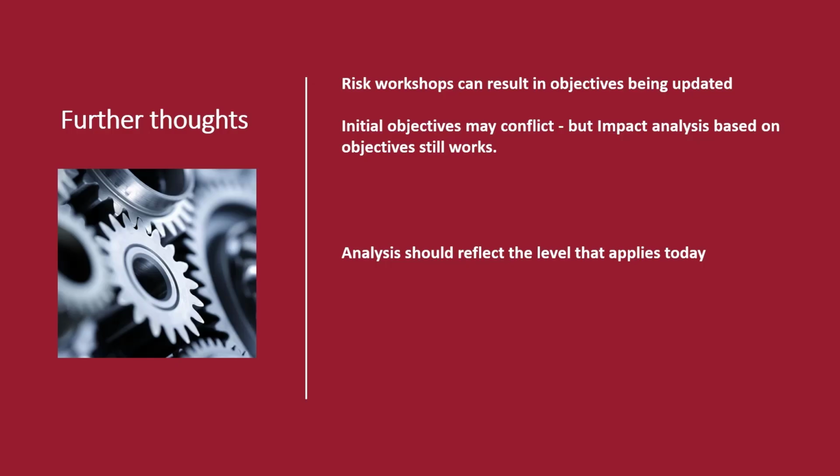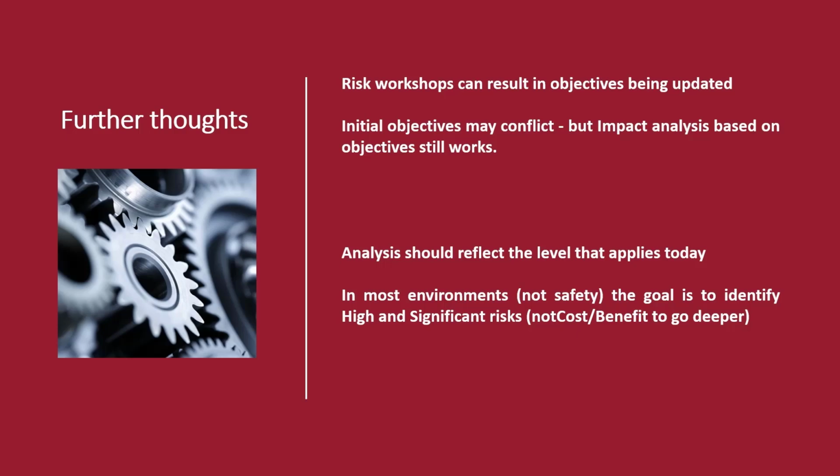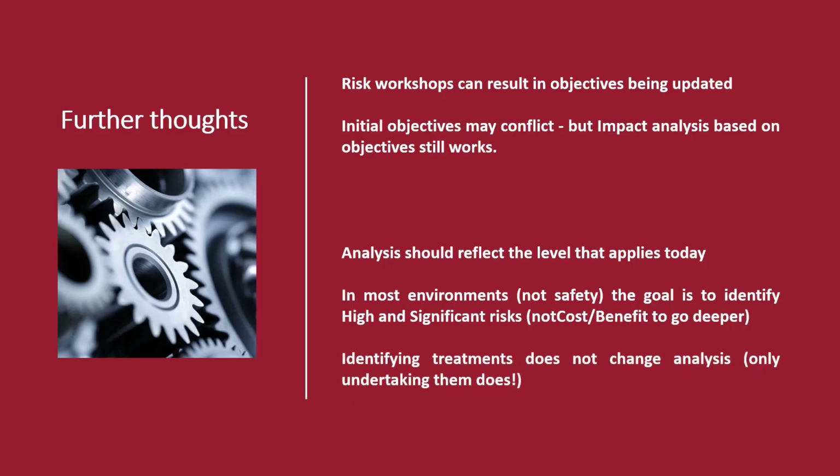That said, the impact analysis works regardless of potential conflict. Analysis should reflect the level that applies today. The goal with most risk management, not safety, is to identify high and significant risks rather than all risks. There is not the cost benefit to go deeper, so move on to the next RBS element. Finally, identifying treatments does not change the analysis. Only undertaking treatments potentially changes the analysis.